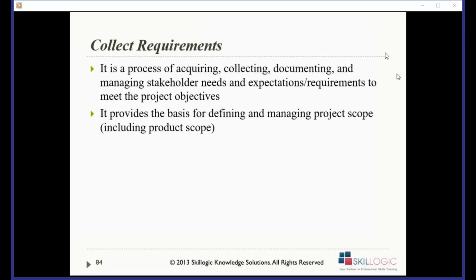I can have the group creativity techniques like Delphi. What is Delphi? Now this is one of the PMP question which often comes in the examination. Always remember, Delphi is nothing but when you send out a survey to your stakeholders and when they are able to respond to it anonymously. Anonymously is the key word. When they're able to respond to it anonymously, that becomes your Delphi technique.